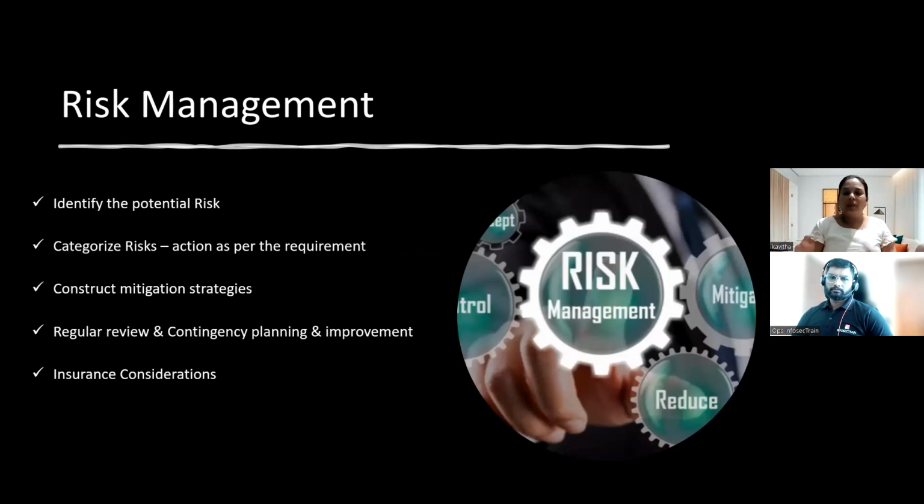It's not that every risk which gets flagged in my tool has to be immediately mitigated. You need to categorize the risk, whether it's a high risk, medium risk, or low risk. Once you categorize it, action it as per the defined timeline. Or you want to transfer the risk, or mitigate the risk based on the activity assigned, you can do it. You need to have a mitigation strategy in place.